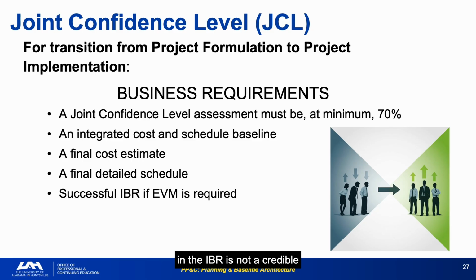These 5 deliverables together constitute the agency baseline commitment. When the project manager signs the ARC, they're attesting that all 5 are complete, integrated, and defensible. That's the highest stakes signature in the program's history. Missing any one of these 5 will prevent the gate transition or produce a conditional approval that comes with risk watch items. Either outcome signals to the review board that the program's planning phase wasn't completed properly.